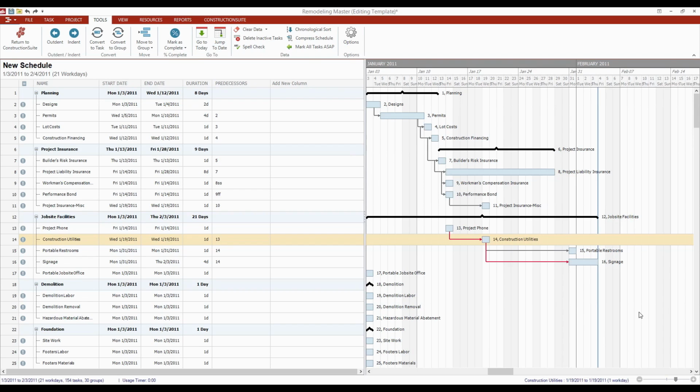It just gives it the option to start then or any time after. If you'd like to change that, this is where the ASAP feature comes into play. ASAP means that the predecessors are going to be shifted from soft predecessors to hard predecessors, and every task is going to finish, as you could guess, as soon as possible.